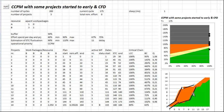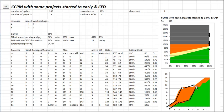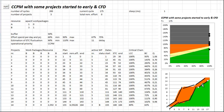After a while when you stop starting the projects, the situation just goes the other way around. You finish projects, you don't start anymore. That's a good way, that means that you recover lead time. After a while the inventory is back to normal, to a very small size, and the duration, the lead time, is back to normal. After this crisis you have the normal situation again of parallel lines.